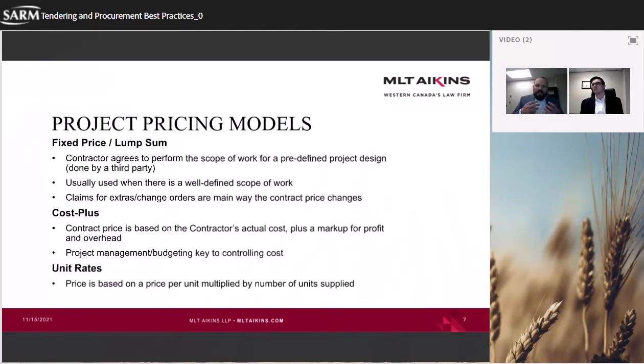What this needs to be, first of all, is that the initial design of what's going to be built needs to be very advanced, to the point that it's almost nearly perfectly done, in order to avoid price escalation and other types of tension and confrontation on the job.